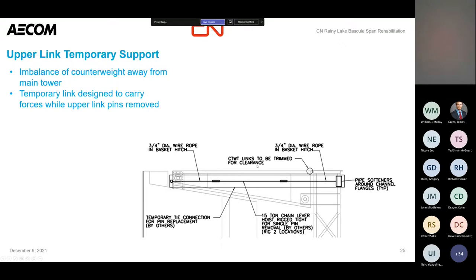Also a note — when working on movable bridges, we were planning to jack the counterweight to remove the load from the trunnion underneath. We expected a little bit of rebound from the span as we jacked, and weren't sure how high it would have to go to pull that load off. During our inspection, we noted a minimal gap between the link and the tower, so we included in the plans for the contractor to monitor that during construction and trim the steel if needed to avoid binding and causing damage.